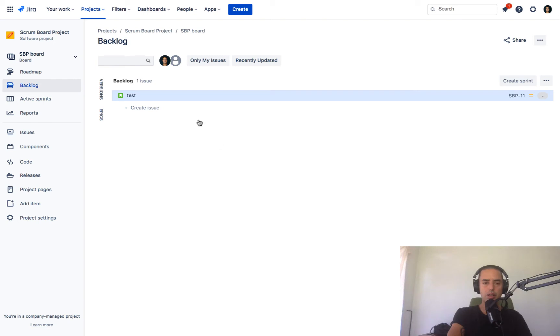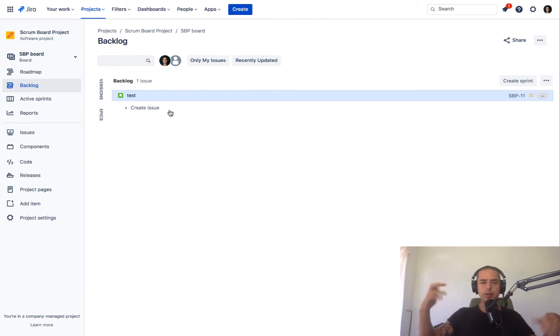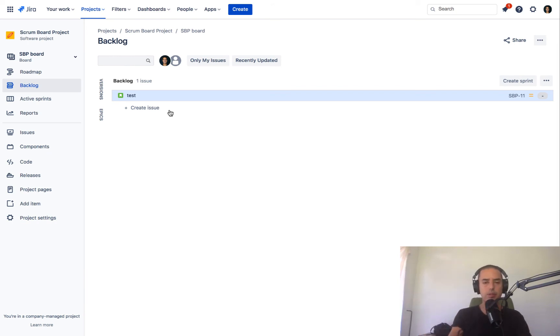You are just moving it back to backlog. Okay, so this is pretty easy. This is how you can delete a sprint before it is completed or before it's active.